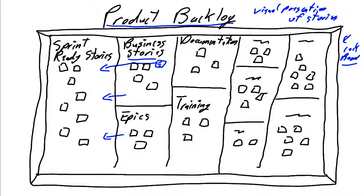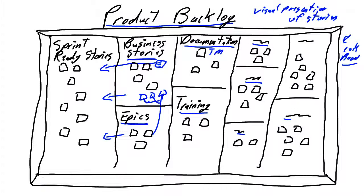It's not necessary to categorize your stories by epics. Epics are simply very large business stories that need to be further decomposed — one epic will break down into multiple user stories. You may also have stories associated with documentation requirements like a training manual, stories for specific training needs, team stories, or stories associated with technical debt. How you categorize your stories is going to be based on the type and nature of the project you're working on.